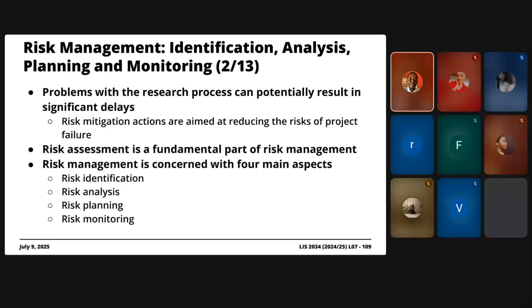Anyhow, and then monitoring, right? Because if you identify things that can go wrong, and you're going to be doing this for, let's say, 4 months in your case, August and September, for the next 2 months or something like that, we have got to come up with a plan on how we are going to be assessing these things we've identified as risks. So maybe every week we'll sit.